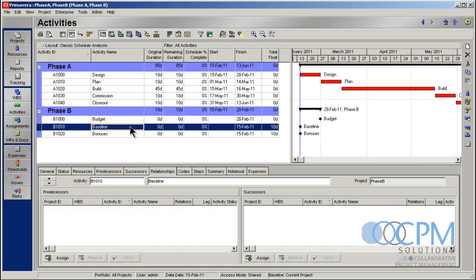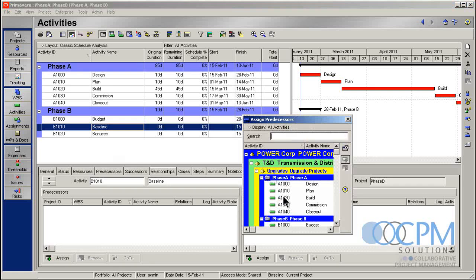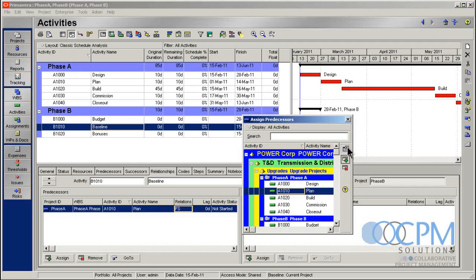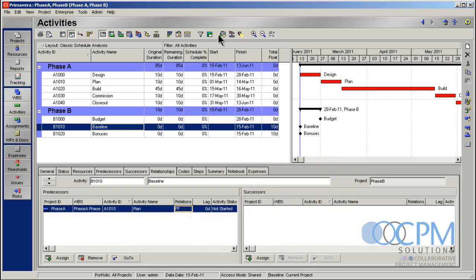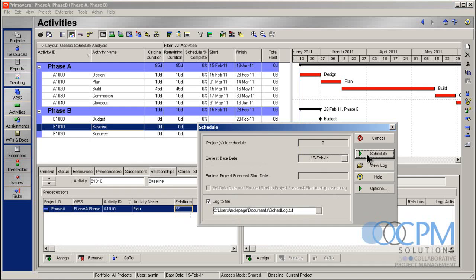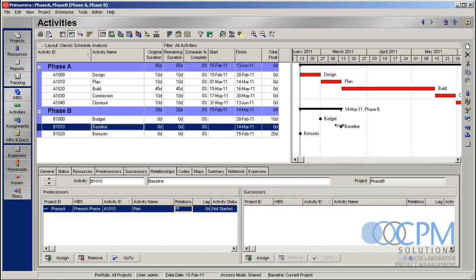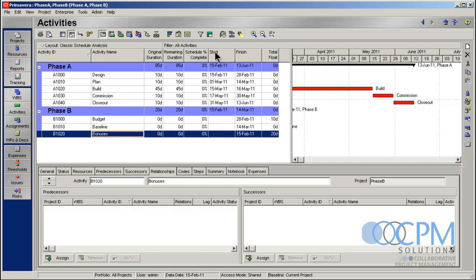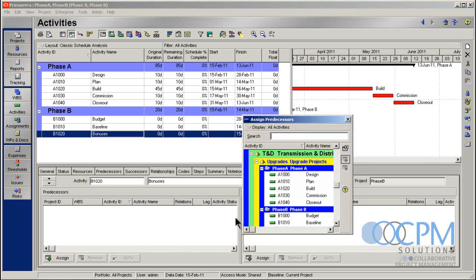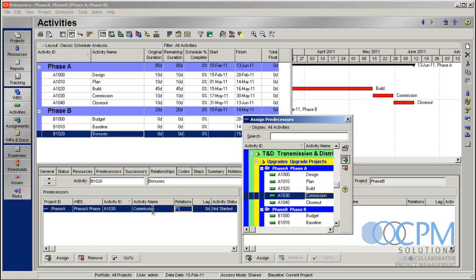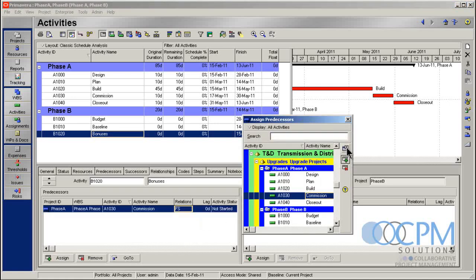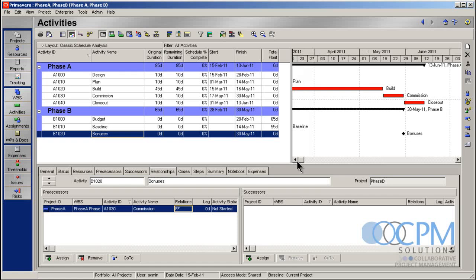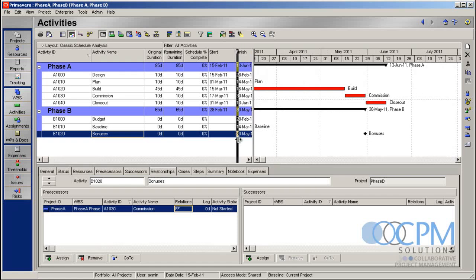Similarly, I'm going to do the same thing with the baseline. I'm going to make the baseline show up in the project after the planning is done. So again, I put it in there. I can make it a finish-to-finish so that these two finish at the same time. Schedule the project. Let's see what happens. All right. So there's my baseline milestone. Now bonuses are going to occur after I've done my commissioning. So let's go ahead. That's when we get paid out our bonus payouts. Everybody likes payday. Put that in there. Again, finish-to-finish. Schedule the project. Great. Now let's make a little room here. Trim things down a little bit so we can get the whole project looking together.